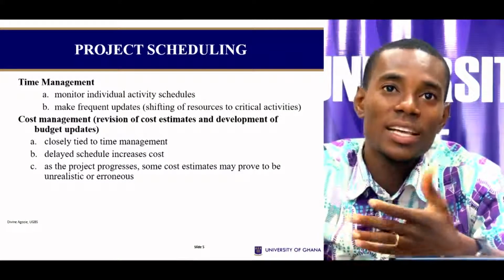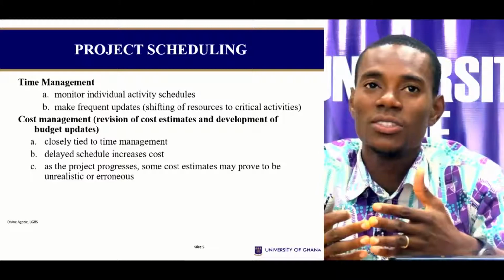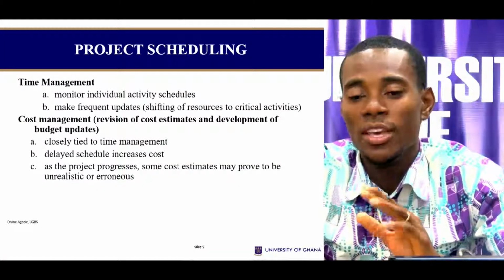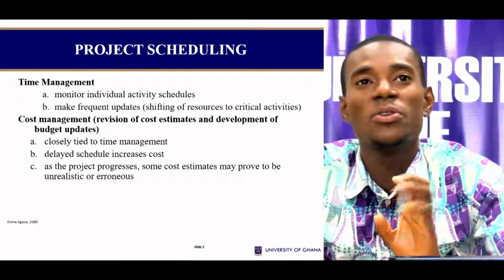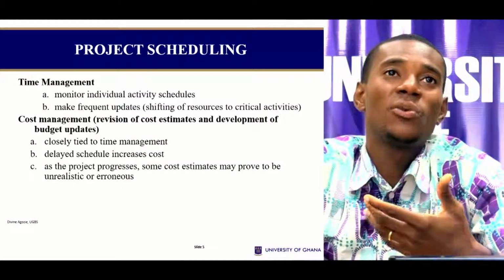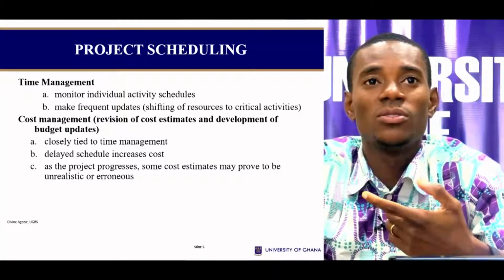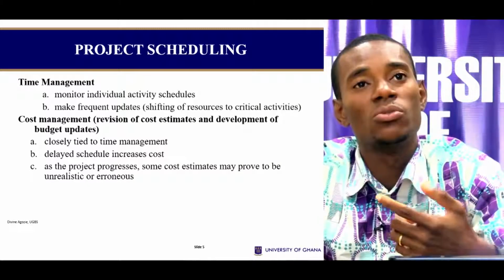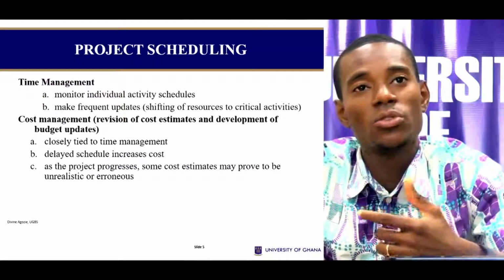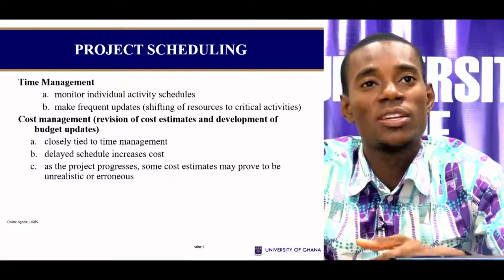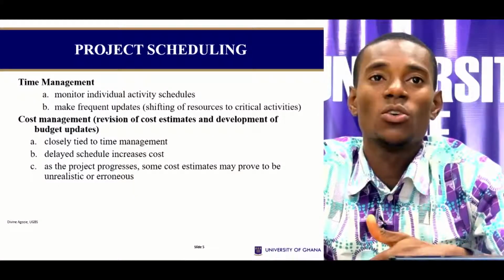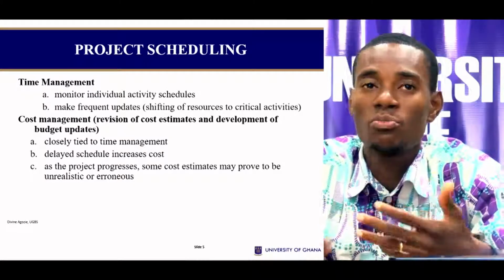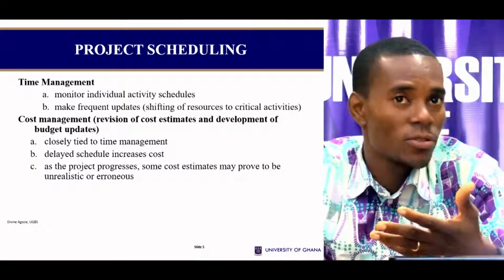So closely tied to time management, delay schedules increase costs. So exactly, these two work hand in hand. Now, someone may not understand how not meeting our schedule culminates into increased costs. If we have a project that we schedule to complete in 3 days and it goes to 5 days, those are 2 extra days that probably you're going to have people working, or you would have to get extra power. And once the 2 days, you're going to pay overtime, and you didn't plan to pay overtime,